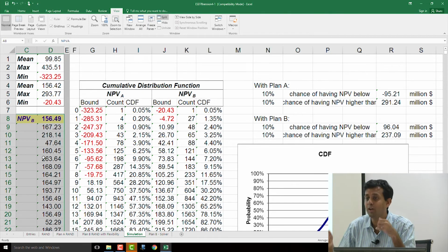The third is the option, the flexibility, where you're saying, I'm actually going to build only when demand exists. So that extra capital investment will get an immediate return. And if the demand is low, I will not waste extra money on capital investment. So that essentially is flexibility: the ability to choose, in this case, when to invest. That's one kind of flexibility, the flexibility to expand your production. There are many other kinds of flexibilities.